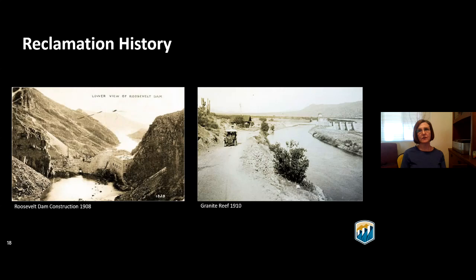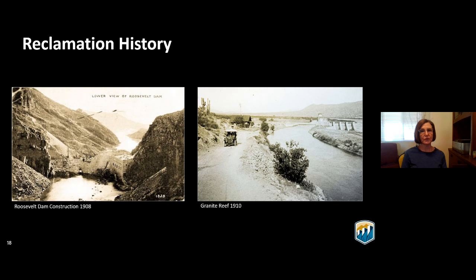In 1903, Reclamation authorized its first five projects, among them the Salt River Project in Arizona. Roosevelt Dam was one of the Salt River Project facilities. It rose to the top of the Reclamation project list because landowners had formed the Salt River Valley Water Users Association with a cooperative agreement on how they would donate land, share water, and pay back project costs. In 1905 they started construction on Roosevelt Dam, and about a year in, the cost of oil skyrocketed, blowing up the project budget. They decided to install their own power at the facility. By 1906 they were generating all their project power, and by 1909 they were delivering power to Phoenix, making Roosevelt Dam Reclamation's first multipurpose facility.